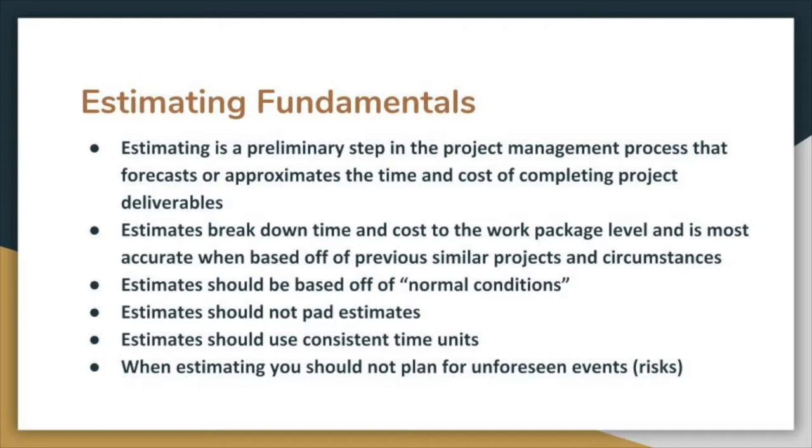And you should use consistent time units. You don't want one person making an estimate and thinking that each time unit is a week long and another using an estimate thinking that the unit is a business day. And then when you estimate, you shouldn't plan for unforeseen events.